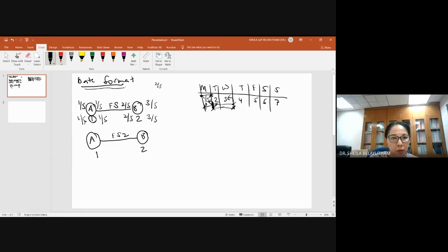Okay, good. All right, so the next date will start on the 4th. Let's say we start on the 4th here. One working day, it shows the finish of 4th. So you start in the morning, it shows the finish of 4th. Okay, finish to start 2 days, you have the lag in between. So 1 day, 2 day, you end here, which shows the start of 7.